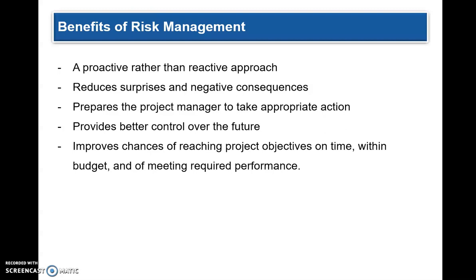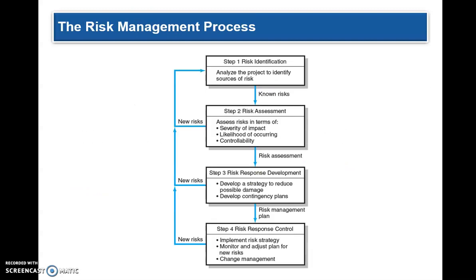It improves the chances of reaching the project objectives, and it improves the probability that you can finish the project on time and within budget and meeting required performance. The risk management process consists of risk identification, risk assessment, risk response development, and risk response control.